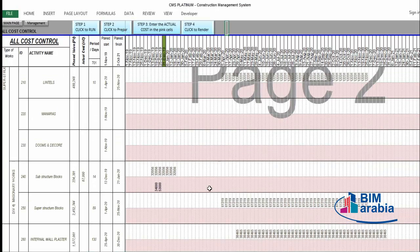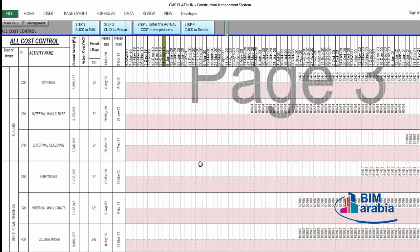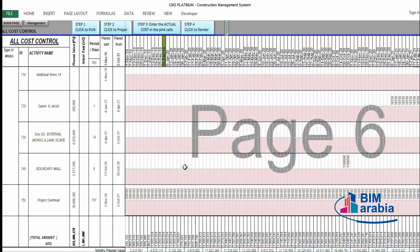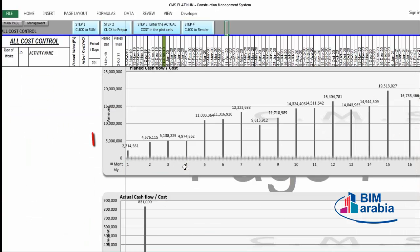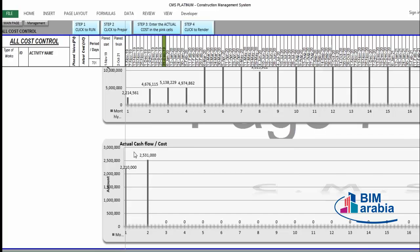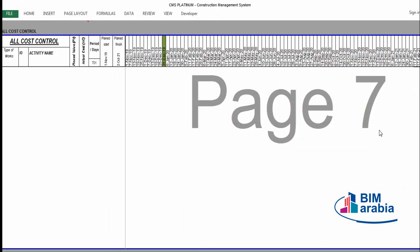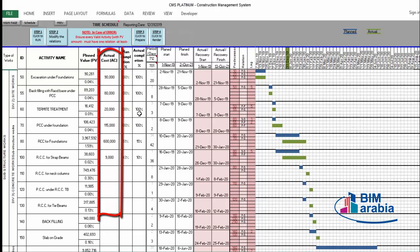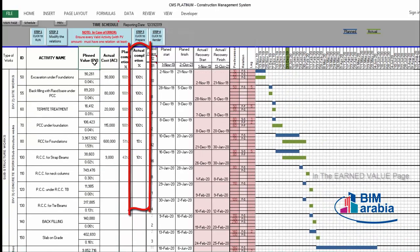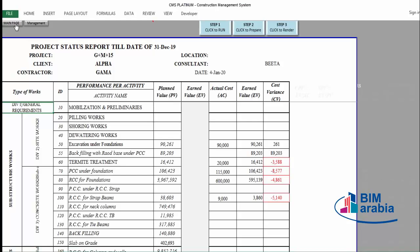Now we have all the planned and actual cost for the completed tasks. Here you'll find the planned cash flow showing the required cash flow every month, and the actual expenditure for the first and second months. Let's go back to the schedule — we'll find the actual cost now appearing for each activity. CMS now has the actual cost, the planned value, and the earned value. Let's see how CMS will use this data to provide the status report and dashboard.